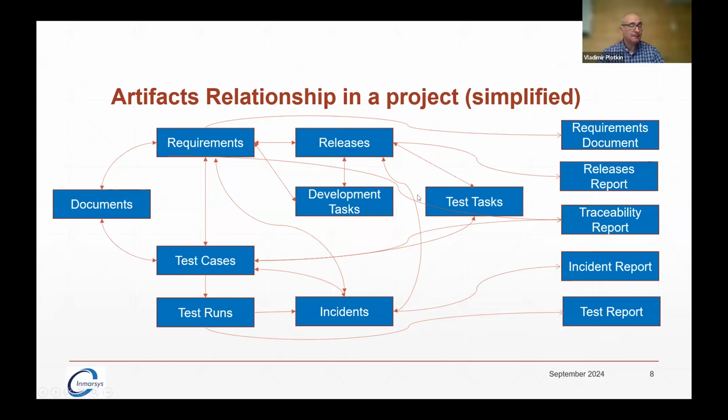Same thing with test tasks. Testers can also operate on a task level and attach it to a release. Sometimes it works, sometimes it doesn't. Not because Spira has some problem or bug, but because of the velocities of different teams. Developers can go at one velocity, testers at a different velocity. They might have their own sprint time allocation, so they may have sprints of 3 weeks or 2 weeks, whereas the developers can have a one-week sprint or a 1-month sprint. It really depends on how the project is managed. I'm not going to touch it here in more detail, but it's something to keep in mind.